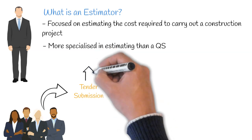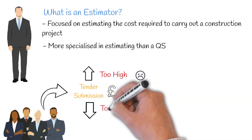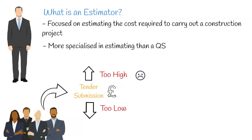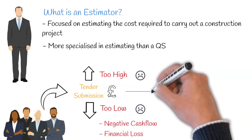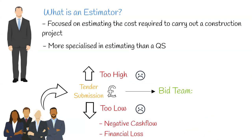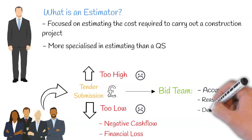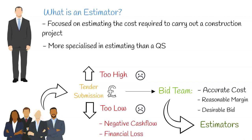This is an extremely important task, as if the price is too high they may miss out on a lucrative opportunity, and if the price is too low they may have just won themselves a project which is going to have devastating financial implications, resulting in a negative cash flow and an overall financial loss. It's for this reason construction companies will often employ a bid team with the primary focus of determining what the project will cost, including a reasonable margin, formulating a desirable bid for the client. The bid team will contain estimators who use their skills and expertise to help formalize the financial element of the bid package.